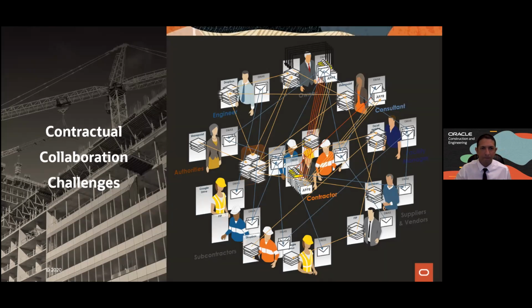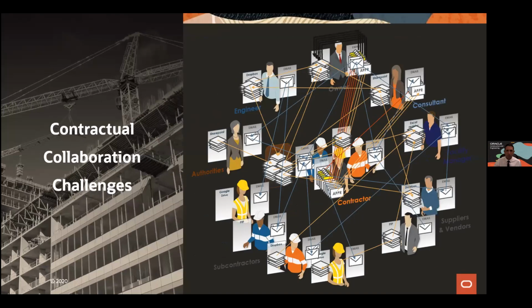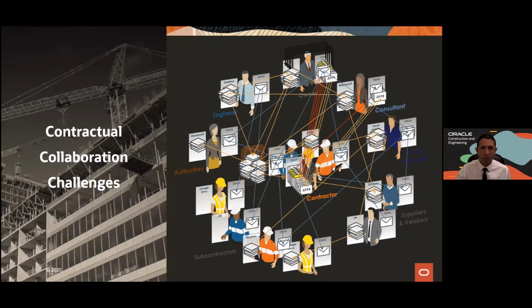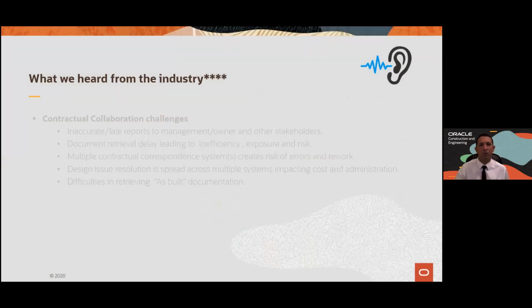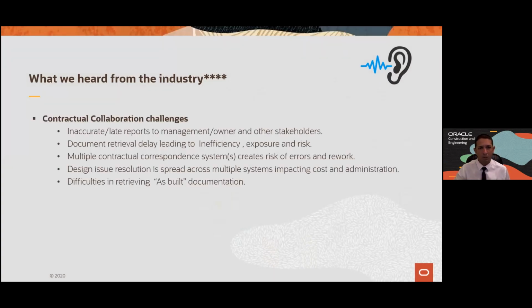If everyone is doing that using Dropbox, SharePoint, or Google Drive, then it becomes a big mess at the end. You lose the audit trail, and you don't know which version of the document is the most up to date. This is also what causes disputes in construction. So if we narrow down these challenges in collaboration, we come up with about 5 main challenges.